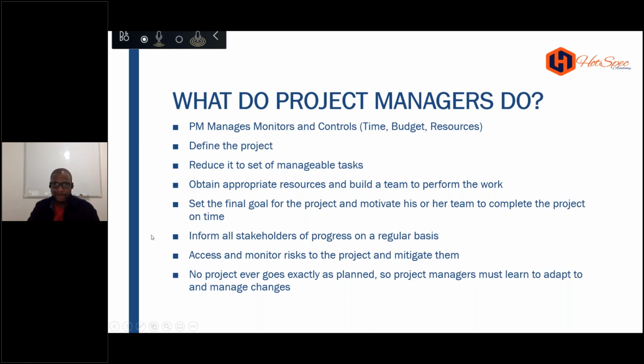When the BA understands, you've got a requirement, and that requirement gives you the scope. Define it. Then when you define the project, you break the project down again into phases. Understanding of the project life cycle will tell you what sort of phases you should have on that project. I can give you a brief illustration at some point, but my high-level requirement stays there. That's the project objective. When that is understood, I can break that down into a set of tasks. Now, project phases, that's what happens. I break it down into project phases.